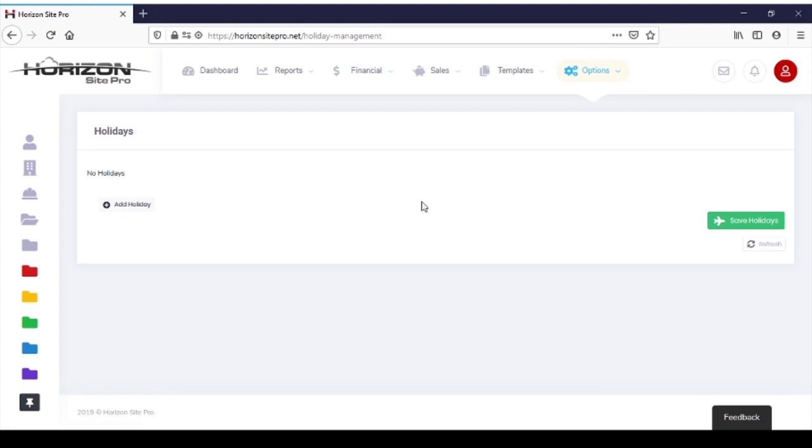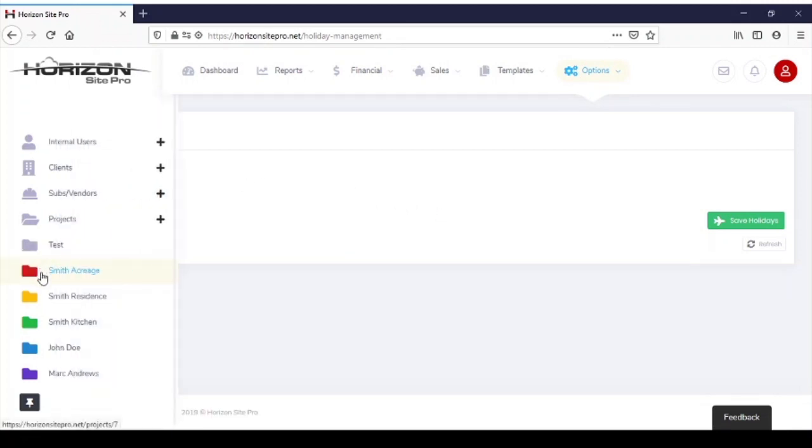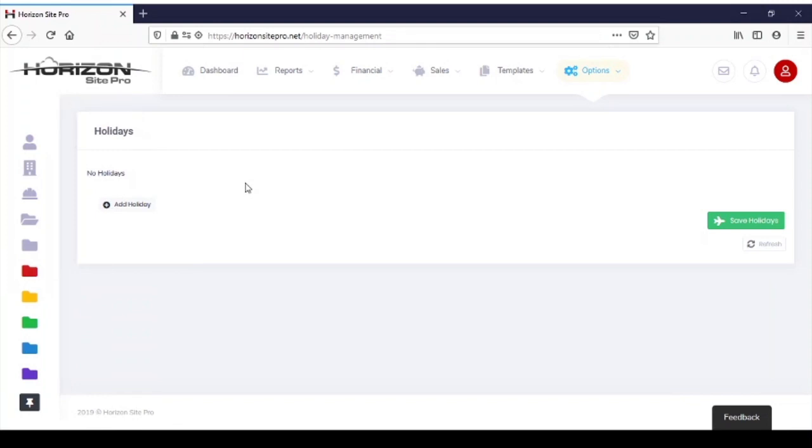Holidays impact your scheduling, how accurate things are, when your work days are going to be. Every area of the country is different when the stat holidays are, so you have to enter what is applicable to your area, create the days, then your full year is created, and your scheduling will be accurate. You don't want to create a bunch of jobs and then not have accurate schedules because your stat holidays are not entered.